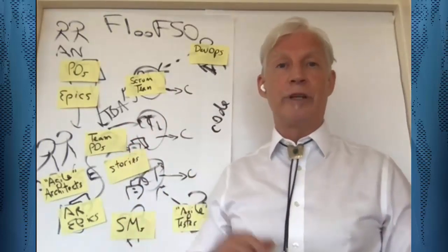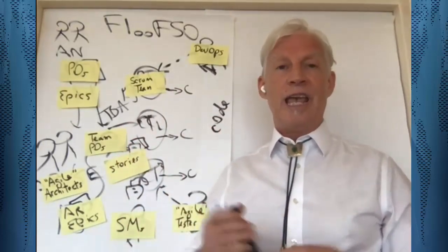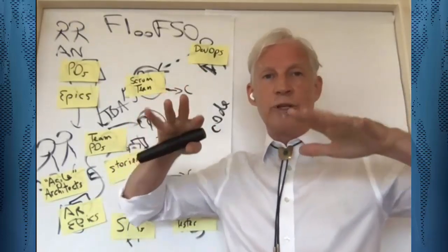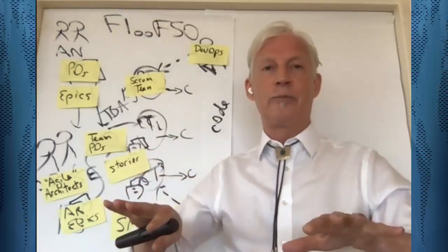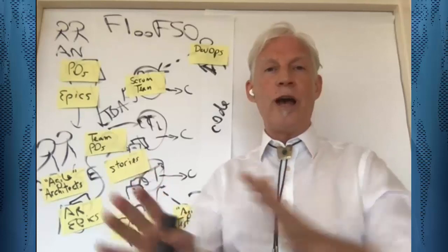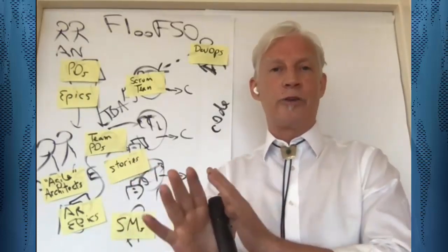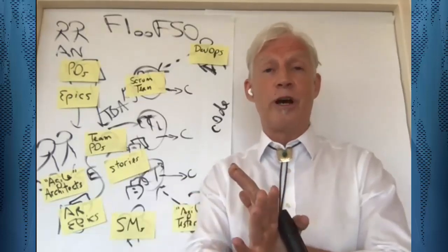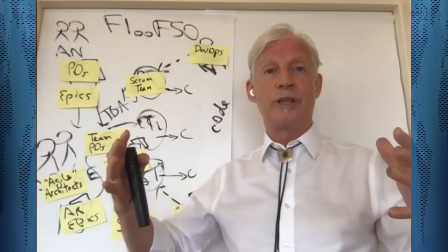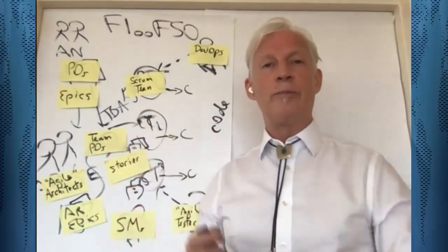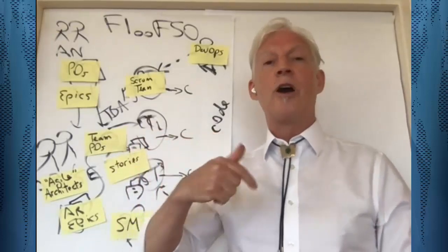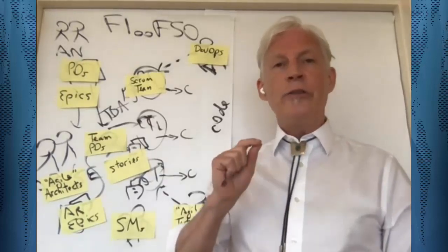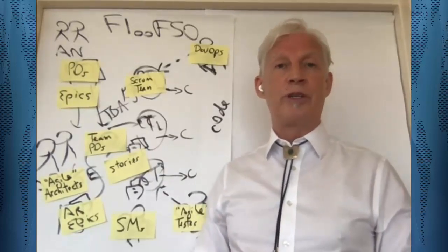Similarly, with respect to adaptiveness, the transaction cost and switching cost, if there's some kind of a larger initiative of change in the company, which then would cascade into, let's say, the 10 different little products, then getting them all lined up in a new direction in order to move in that new direction as one is going to have a high transaction cost and a higher switching cost than if it was one broader product altogether. So for both of those examples, we can see that many small products are inconsistent with adaptiveness and inconsistent with low cycle time.